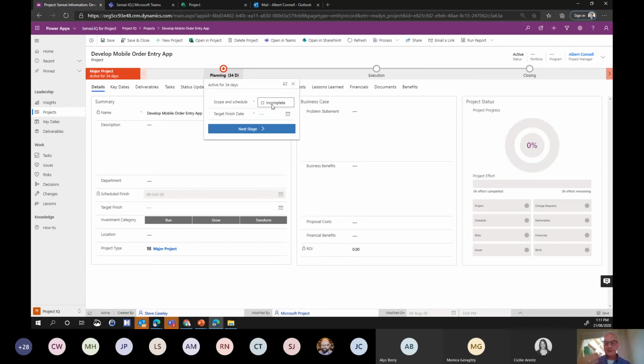They say, yes, of course, that it is governed and that it is checked by the PMO, but they also are very much influenced by the confidence factor of the project manager. So in Empower, for example, we have a 5-star rating of each stage gate approval, where the project manager can rate their confidence factor. And if the confidence factor has 5 stars, then the executive is mostly inclined to continue with the project and go through that stage gate approval process.